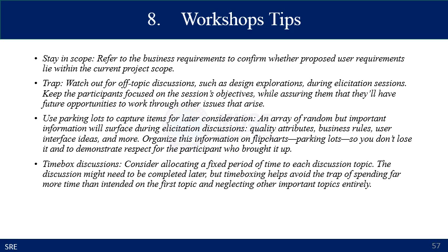Use parking lots to capture items for later consideration, and consider time boxing: allocate a fixed period of time to each discussion topic without wasting your time.